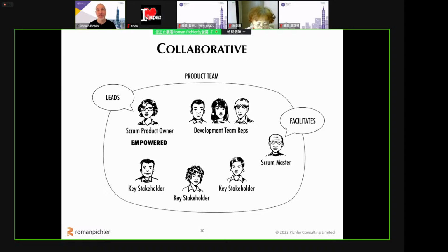The Scrum Master ensures that maybe there are some ground rules being followed, that there's a clear decision rule being used, such as consent. That means a decision is made if nobody has any meaningful objections. So get your Scrum Master into those collaborative road mapping workshops and ask your Scrum Master to facilitate so that if you're the product owner, you can focus on making the right product decisions or making sure that the right product decisions are being made.